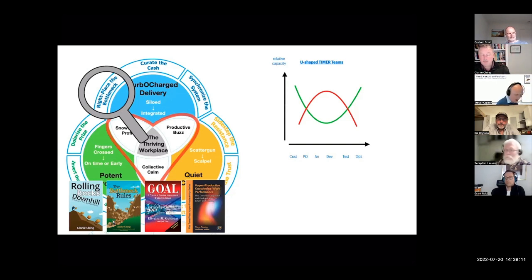Another one that's really, really helpful for people is if you've got solutions coming in and you've got two options. I was talking with one of the people on the call here about this yesterday, ages ago. There's this team and they were building these features, and it's like you'd ask them for every feature saying, hey, look, I need you to book a hotel. And they'd book you a 5-star hotel. And a lot of the time you actually only needed a 2-star B&B. So again, that's curating the work that comes into the team according to the amount of effort and where the bottleneck is.